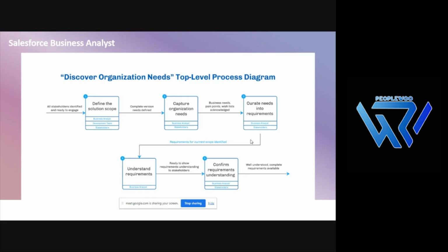So we will ask them to explain the business process. We'll capture it. We'll record all the responses that they provided us, and then we will throw them questions and queries on that process, and they would respond back. We'll record everything, and we document it into a requirement based on the methodology that you choose, be it waterfall or agile. We will structure it with respect to that particular methodology, either as a business requirement document or a backlog.